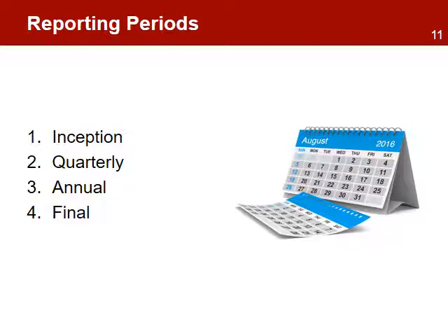Project reports can be categorized by the time they are needed. Each report will contain information to meet the needs of the project and stakeholders at different times during the life of the project, from inception or the time at the start of the implementation phase, quarterly reports to monitor the implementation process, annual reports that consolidate information, and the final report to inform about the results of the project. The donor, the organization, and key stakeholders may have different reporting needs at each one of these reporting periods.